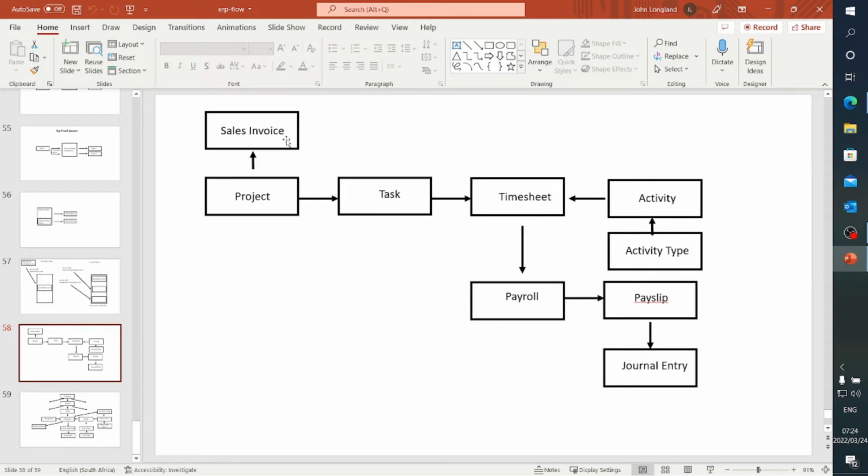Excuse me, but there's also a costing bit involved. And you want to keep track of that because if you don't, then you don't know if your project was profitable or not. Now, there's two ways to look at this. Under the project, it keeps track of all your costs, so that's fine. But those costs are only reflected, especially the timesheet part, once the payroll is done. And I'll show that to you.